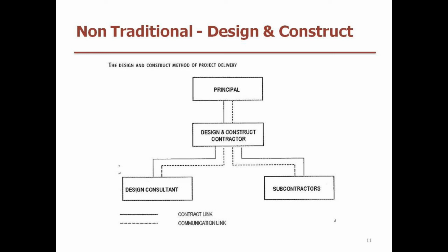Design and construct is an extremely popular way of getting an asset delivered on time and on budget. It doesn't always give us the convenience of maintenance and asset management like build, own, operate and transfer. But what it does do is satisfy the client's requirements with timing and often cost. There's often a little problem possibly with quality, but having said that, design and construct really was born out of the client's dissatisfaction with previous models, relationship of contract arrangements such as traditional.